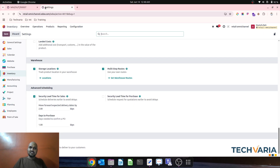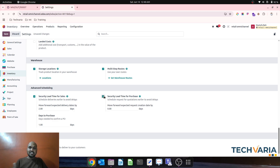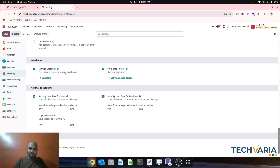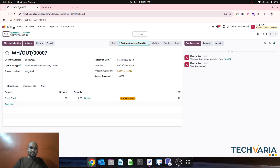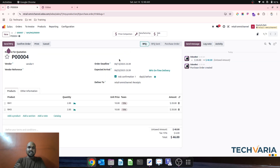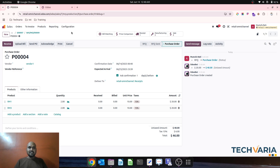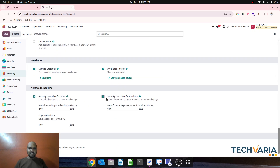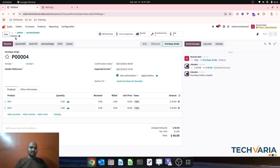You can also set a security lead time for purchase. Currently it's zero. Based on demand from manufacturing, a purchase order is raised — the purchase deadline is today and expected arrival is after 12 days, plus one day for customer confirmation to the vendor. If I then enable and set three days of security lead time for purchase, it moves the expected request date forward.